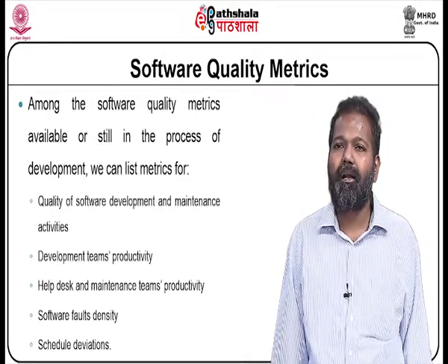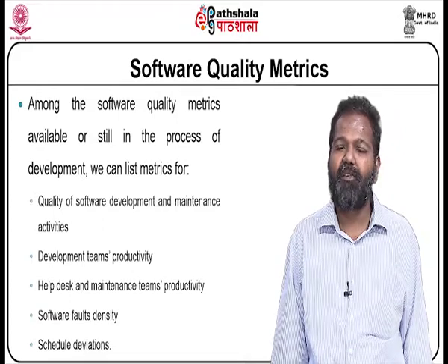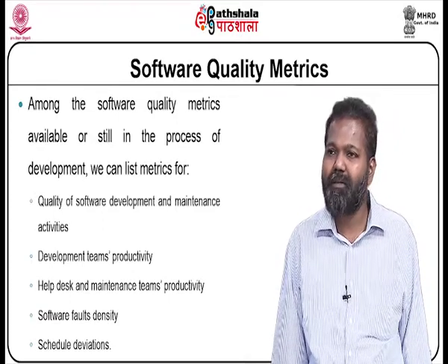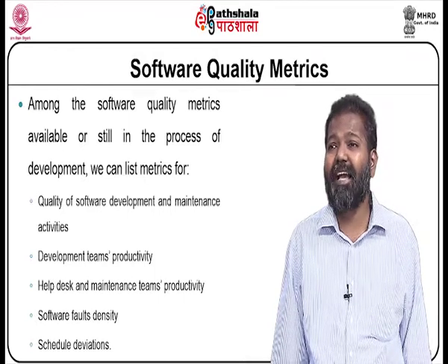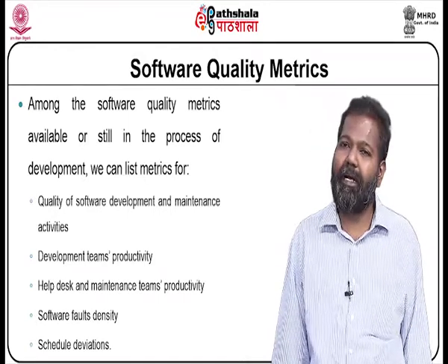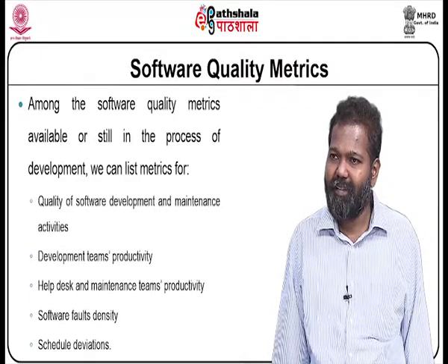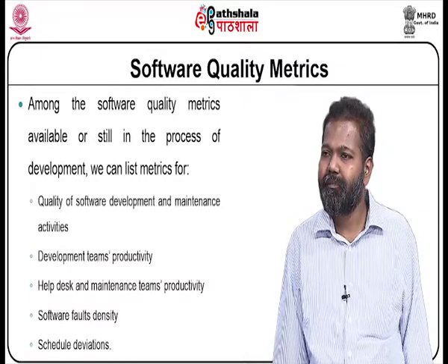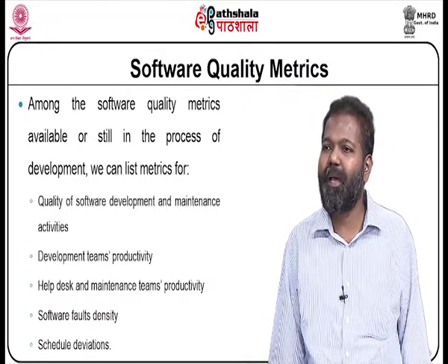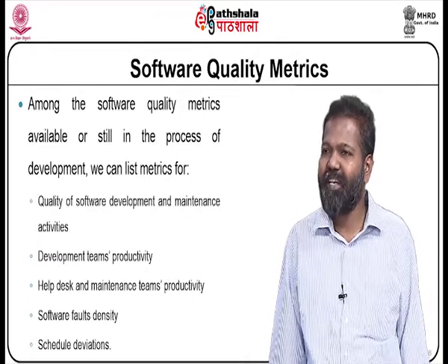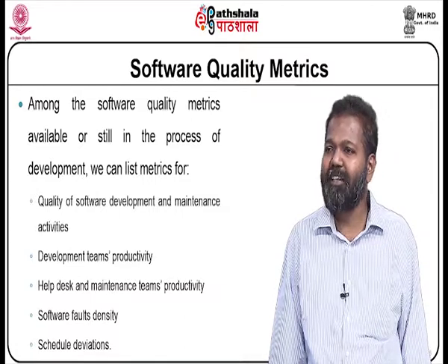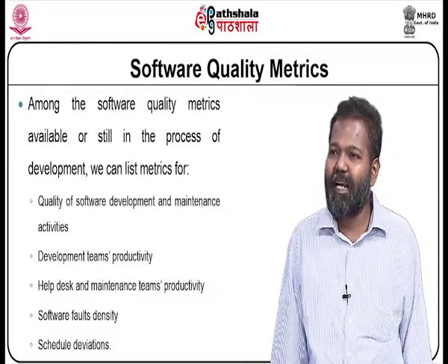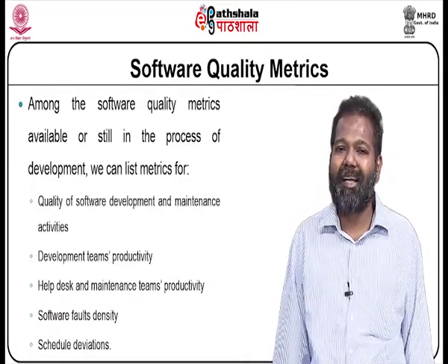For example, if your software requirement specification document is not prepared in time, the design phase may be delayed. When there is a delay in the design phase, the coding phase may get delayed. If the coding is delayed, testing will be delayed, and ultimately you cannot deliver the product in time.